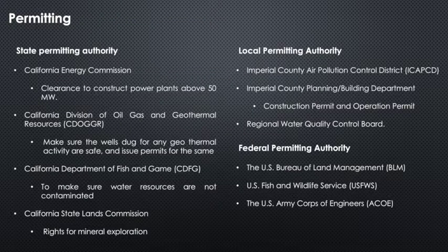Now, let's move to project siting and permitting. We need to identify the permitting issues and responsible agencies, and also seek blanket permits from multiple geothermal project developments located near or under Salton Sea. We should also identify and integrate project development with benefits for Salton Sea restoration. A blanket permit approach reduces the development timelines.